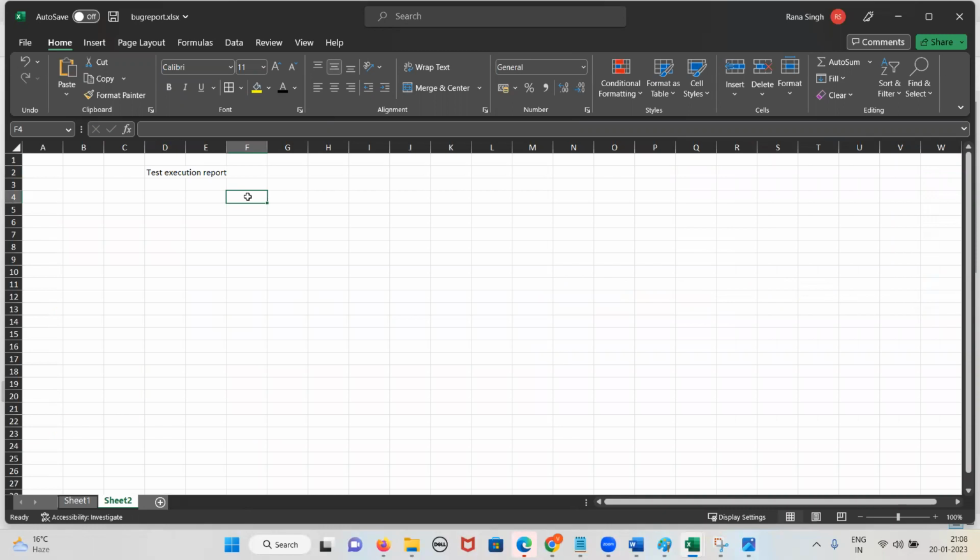If he is not able to finish the assigned task in sprint 1, then who is responsible? The Scrum Master, right? He will either assign it to some other developer or tell him to work on the weekend. If it has completely failed, he will have to communicate to the client and put some other developer. Something he has to manage, right? So it will not carry forward to sprint 2? No, because it is already committed to the client. When you commit any requirements, you cannot move them to the next sprint.